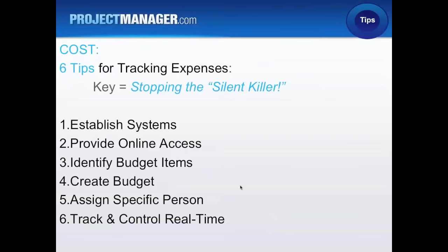So you have to keep going down to the number of hours, and then the hours affects not only the number of hours that I have available to work on the project, which impacts your schedule, and it impacts the budget.